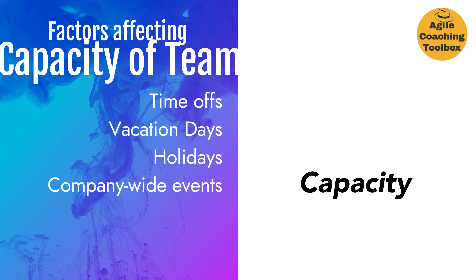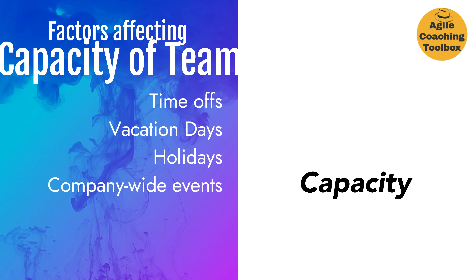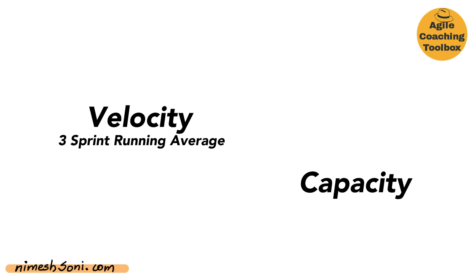What we are looking for is: do we have 80% capacity? Do we have 100% capacity for this upcoming sprint? Consider all the day offs, vacations, company-wide events, and holidays to find out what that capacity is. Then apply that capacity to the velocity you have found out. To help you answer these questions easily, I strongly recommend you set up a team calendar where each team member keeps their time-off requests. This team calendar becomes your go-to artifact to answer the capacity questions.